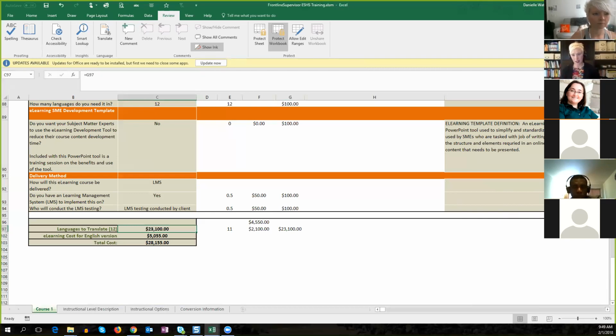So we did some estimates, and then we just gave them a budget and said, okay, here's your budget. I don't even remember what it was, but it was probably $5,000 or $6,000, maybe more. That way I could go out and source all these different languages and fit them in the budget. I only shared people I could afford with the client, and said, here are your two Polish choices, and then they could pick a voice.